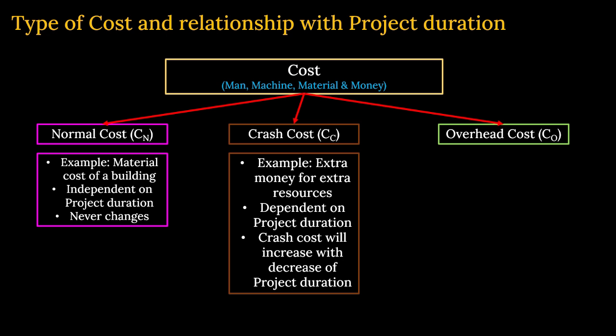So crash cost will increase with decrease of the project duration. The more you want to decrease the project duration, your crash cost will be higher, higher, and higher. So it is increasing when the project duration is getting decreased. You got my point? Fine.